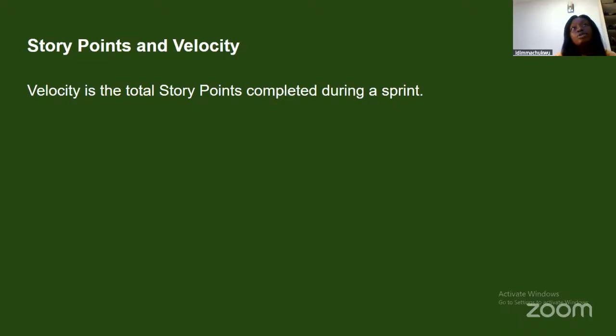But you're not going to say because she has 40 hours, she has to commit the entire 40 hours to the sprint. For you to calculate the capacity, you have to look at what other commitments Gloria has for Bincom. You now have to look at the time for her normal team stand-up. Let's say for the normal team stand-up, she has to do her stand-up 1 hour per day. That's in 5 days, it's going to give you 5.